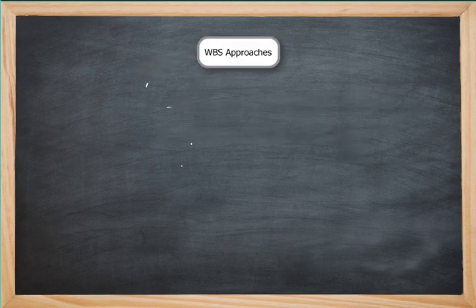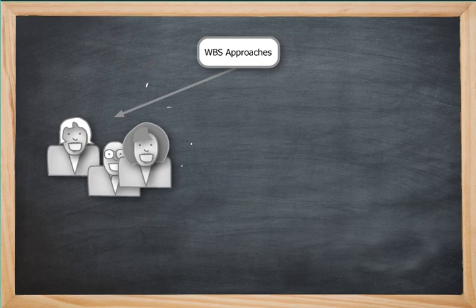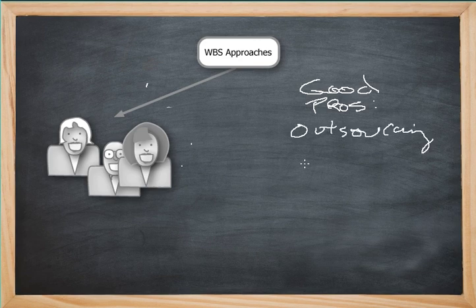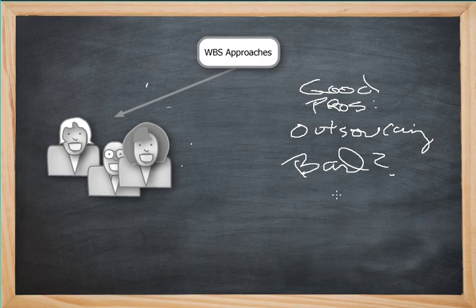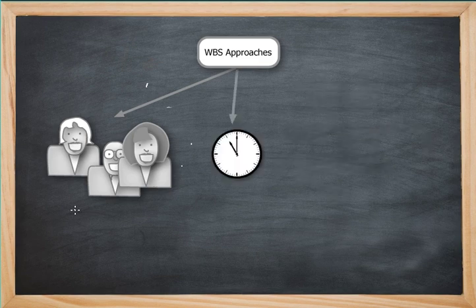There isn't a single way of approaching the creation of a WBS by levels, but here are some common ways. First is by organization — by department, such as engineering, QA, or product management. The good part is this works well for outsourcing part of your project. The bad part is you and your team may try hard to structure the work to fit how your team is organized, which may not be the best breakdown of that work.